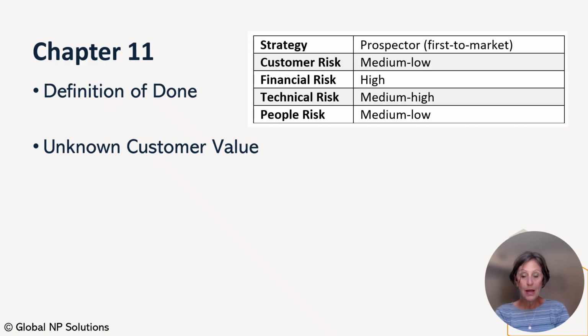Lacking gate reviews, as in a conventional waterfall process, there is not a defined mechanism in Agile to kill projects unless value delivery cannot be met. Regrettably, most organizations implementing Scrum fail to link value to the product backlog and, in skipping retrospectives, also fail to measure value delivery. Thus, without value delivery as part of the definition of done, even unattractive Agile projects can live on and on. Organizations that fail to effectively use value metrics ultimately fail in implementing Agile.